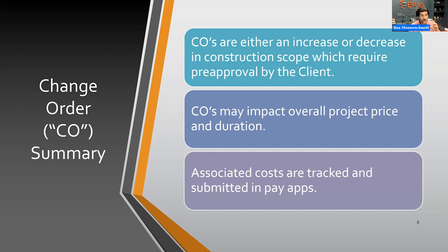and you need to be perfectly abiding by what is in this plan set. There have been some scenarios that I've unfortunately been a part of where that hasn't been the case. The association signed a contract that wasn't even a standard contract, and it made no formal mention of our design plans. Ultimately, that puts me in a position where I can't enforce those plans because they're not explicitly shown there. So having a detailed contract with as many exhibits or provisions as you need, to be reasonably fair and make sure everyone's covered, is going to be critical, because you're going to be falling back upon that in the event there's any discrepancy or any sort of conflict.